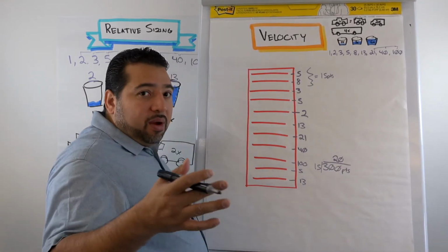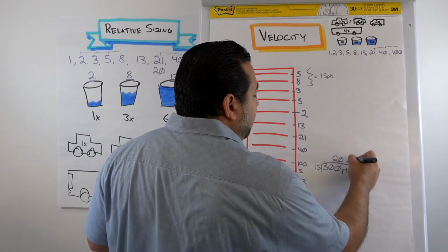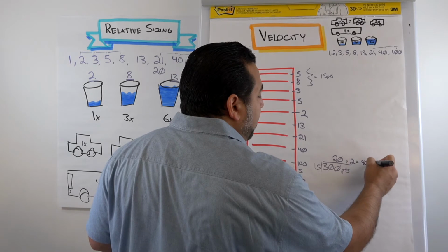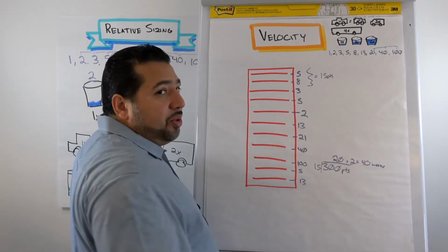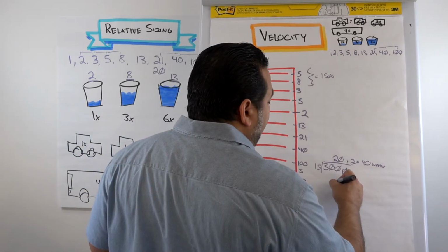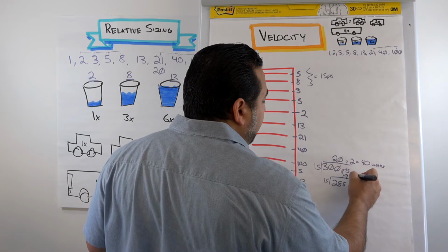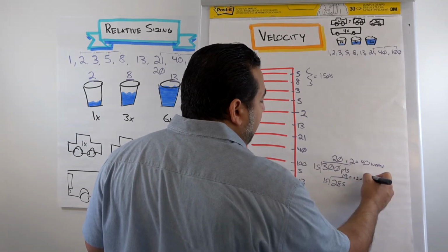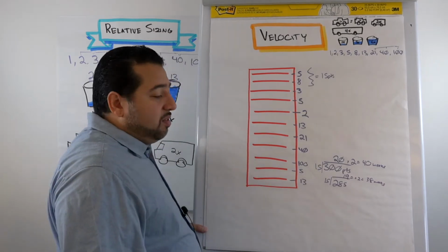A sprint is a time box of 4 weeks or less. Let's assume these are 2-week sprints. 20 sprints times 2 weeks equals 40 weeks to get all this stuff done. Really, it's not 300; it's 285 because they already did 15 points. So that gives me 19 sprints times 2 weeks. Right now, we're looking at 38 weeks left. But that's how I would predict using relative size.